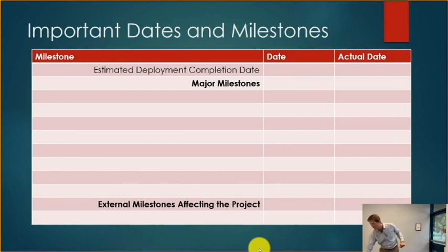But you'll see that the projected completion date was 7/31/2019. And we actually completed the project on 7/18/2019, 13 days ahead of schedule. Thank you all for doing that. That was really a nice win. Bob, your team really, up front, you guys worked on your algorithms, your plan, you figured out, you timed everything. And that timing really bore fruit. It showed us how much time we needed. Thank you.